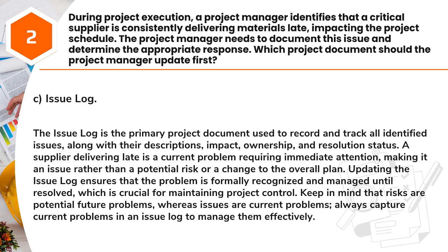Updating the issue log ensures that the problem is formally recognized and managed until resolved, which is crucial for maintaining project control. Keep in mind that risks are potential future problems, whereas issues are current problems. Always capture current problems in an issue log to manage them effectively.